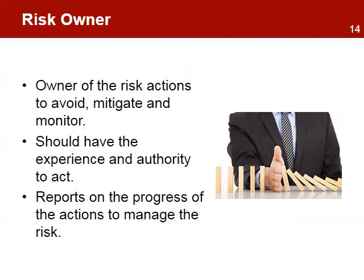In the risk register, the last column identifies the risk owner — the person responsible for taking the actions to avoid, mitigate, and monitor the risk. The risk owner should be capable of managing the risk and have the knowledge, resources, and authority to deal with it. The risk owner is the person who is best placed to understand and implement what needs to be done, and reports on the progress and results of the actions to manage risk to the project manager.